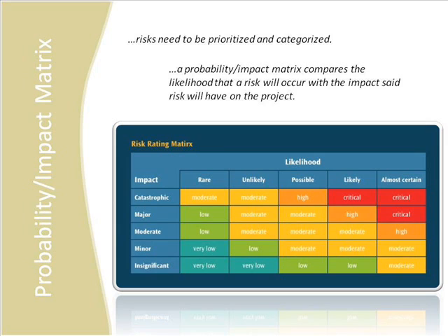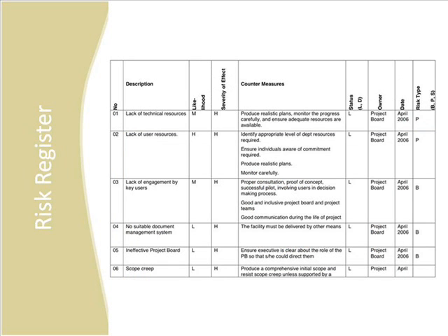The impact chart allows you to rate potential risks on these 2 dimensions. The probability that a risk will occur is represented on one axis, and the impact is on the other axis. A risk register is a tool commonly used in project planning and organizational risk assessments to identify, analyze, and manage risks. It takes all risk information gathered throughout the project and combines it into one easy-to-read chart. The risk register contains the information about identified project risks such as likelihood, severity, countermeasures, status, risk owner, risk type, and etc.